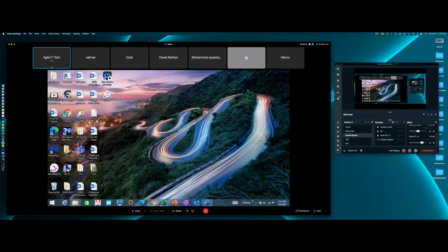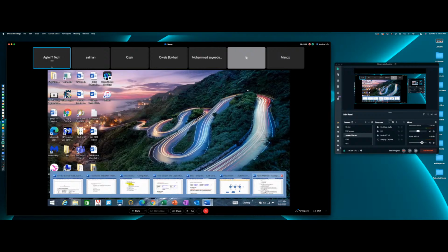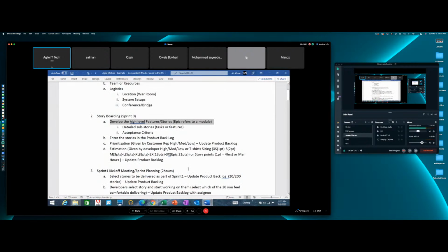So coming back to us, to the Word document, right? So we have identified the high level epics, we identified the stories. Now we will start to take those stories off the board and we're going to start to come up with what are the sub tasks or sub features for each of those stories and try to develop what we call the acceptance criteria. So of course, the first one I'm going to go after is the pinks, right? Because those are the highest priority items, correct? So I'll take the user ID and password one out and then I'll start talking about it.